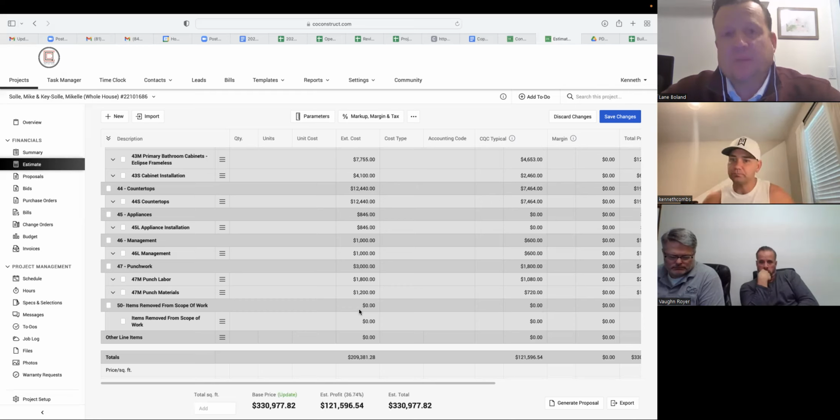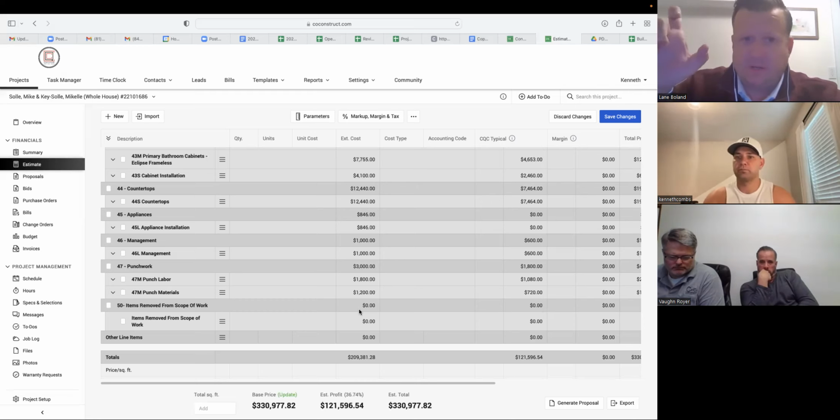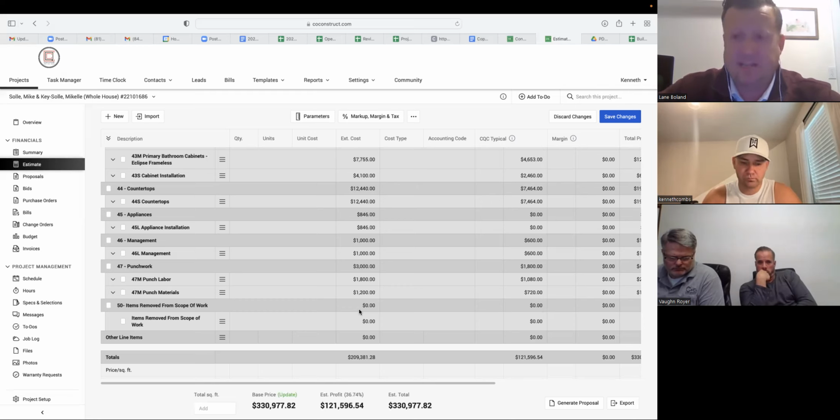So Justin, based on what you described, I like that idea because that differential changes from an addition to a kitchen to a bathroom, and it also changes by square foot. I think that's a great idea. Let's go ahead and create that calculator based on product and square footage, and we'll preload the diffs in an Excel spreadsheet to come up with the X and Y, and you could do that right in front of the client.